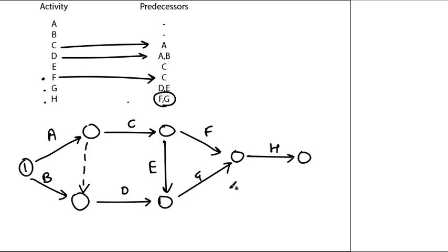So this is an actual project network diagram. I hope you understood how to draw it. Then start numbering the nodes 1, 2, 3, then comes node 4, 5, this will be 6 and this will be 7. So see, a project network diagram has only one start node, one end node. Arrows are from left to right. There is a dummy activity introduced.